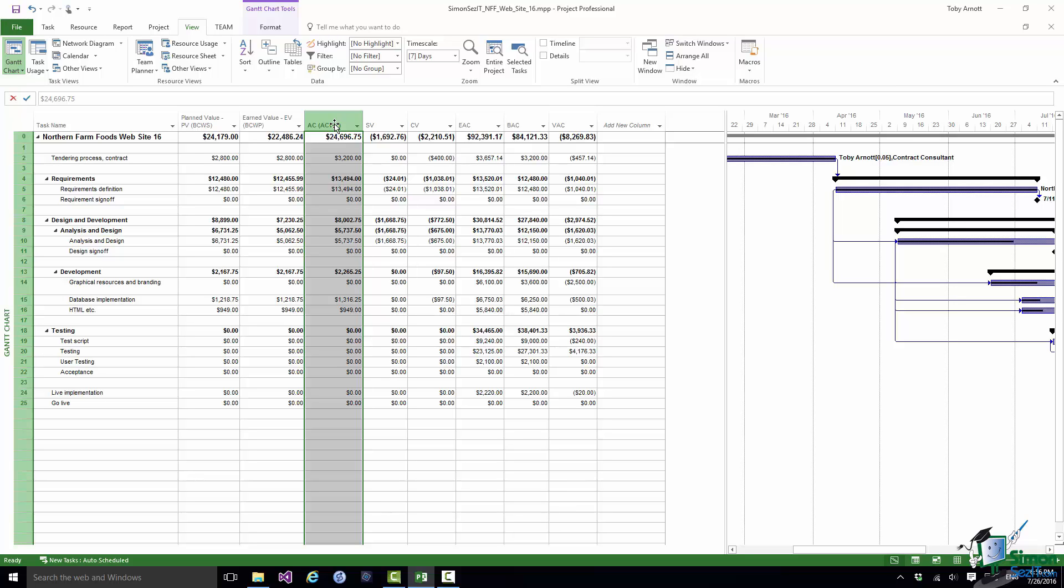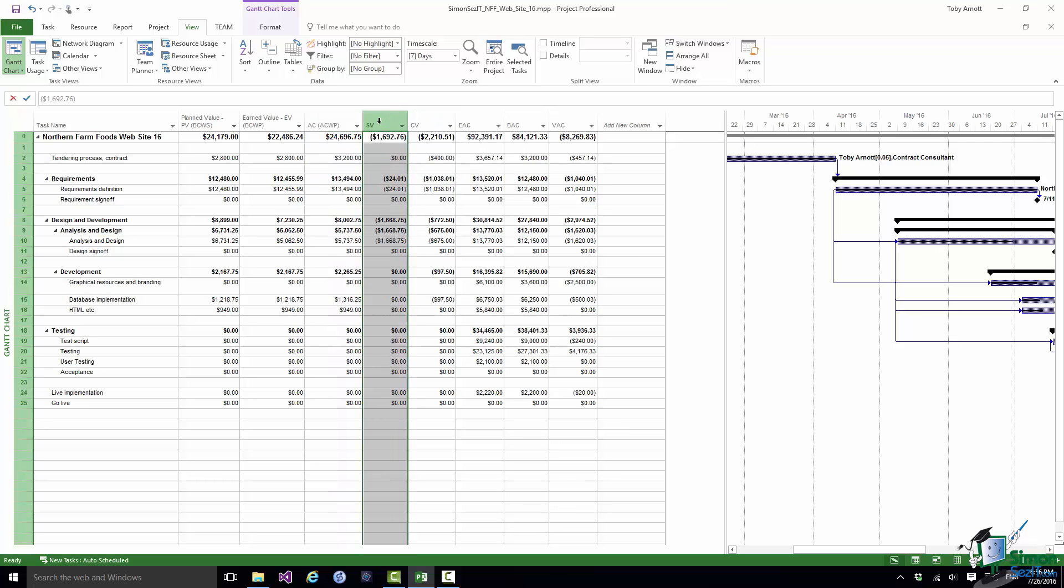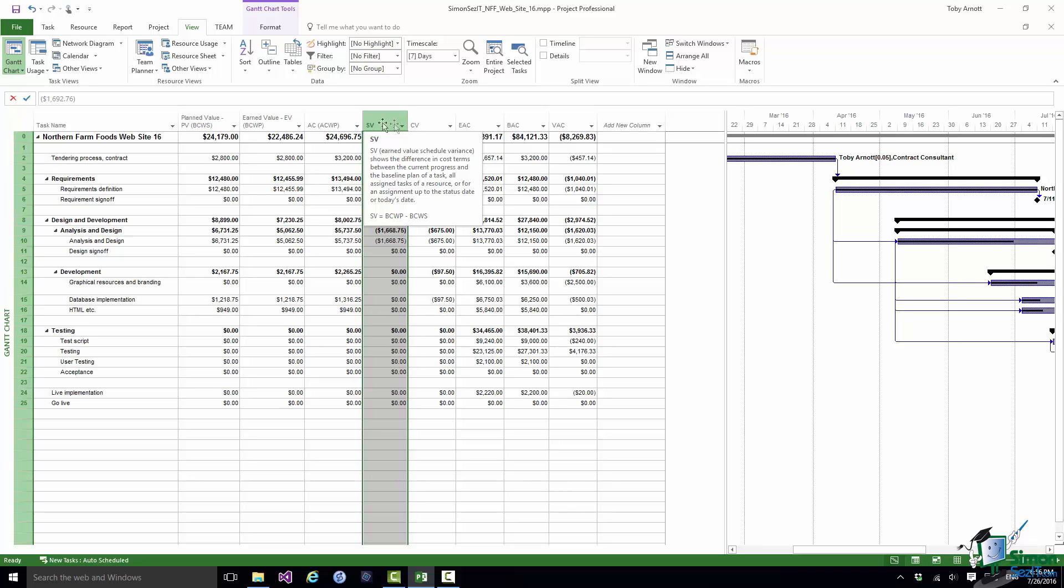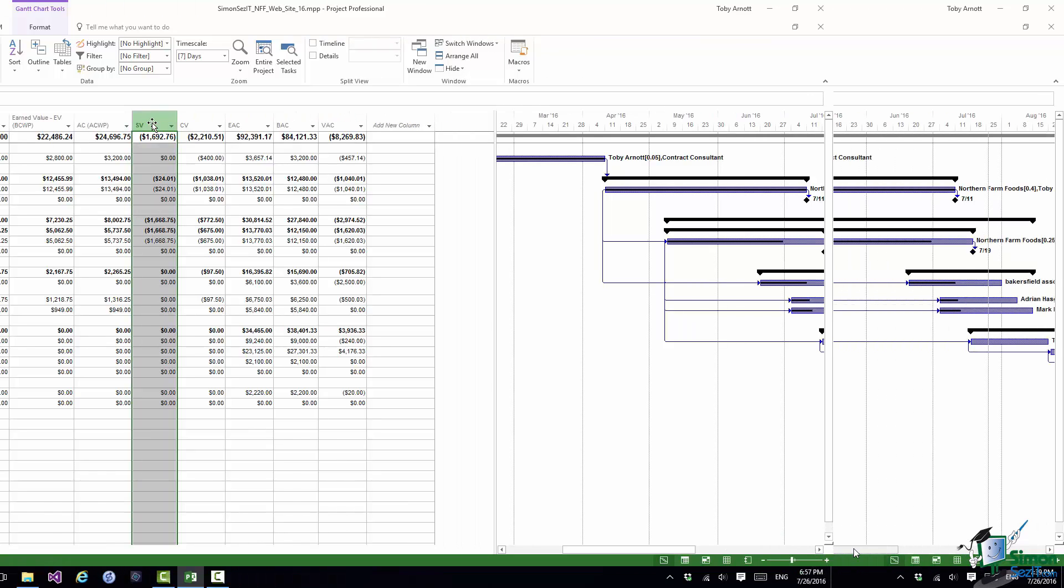Now to the right of these three we have two more very important statistics. We have SV and CV, Schedule Variance and Cost Variance. In the case of Schedule Variance you can see the formula there, SV is BCWP minus BCWS. And above that there is a verbal description of what SV means. It's the difference in cost terms between the current progress and the baseline plan of a task. Now in this column at the moment you can see that most of the entries have a zero dollars which means for any task that in cost terms it is going to schedule. Where you have a negative cost that means that in cost terms the task is behind schedule. In particular if you look at the task zero which is the project summary task the fact that there is a negative SV value means that overall the project is behind schedule.